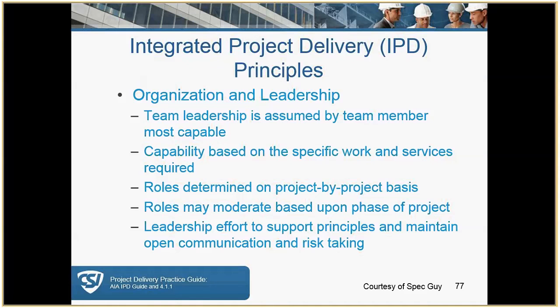It's organization and leadership. I believe Cal Poly actually is teaching a class in that, organizational behavior. There has to be a leader in the process. And that leader, during the design process, might be the lead architect. And then you have to be willing to shift that role to the contractor at a different point, perhaps during bidding and construction.